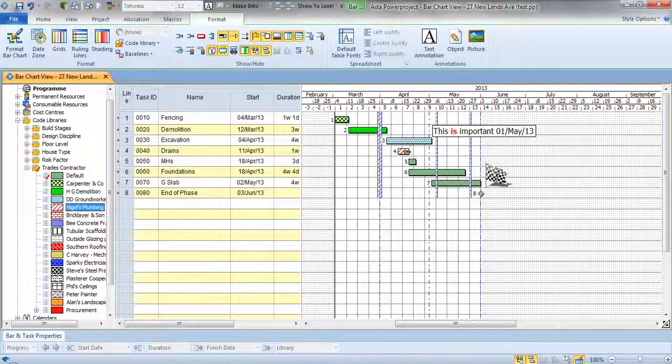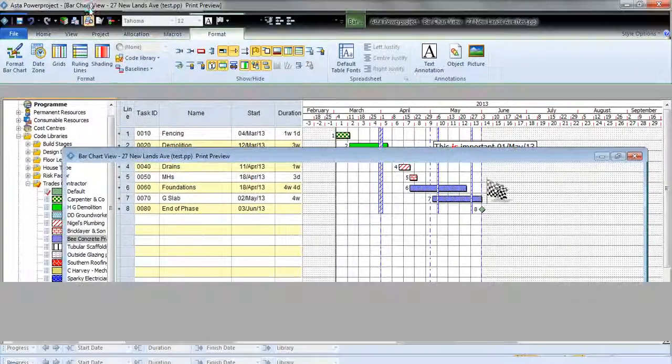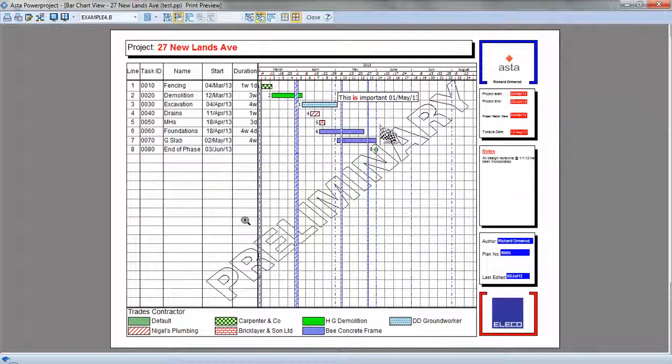And we can either display that in a column on the body of the plan, we could put it as a text annotation after each activity, or we can select, in this case, more than one activity, and we can put a single code onto 2, and so we can see that appearance on screen, but later when we preview that or print it out, we can see that information presented.